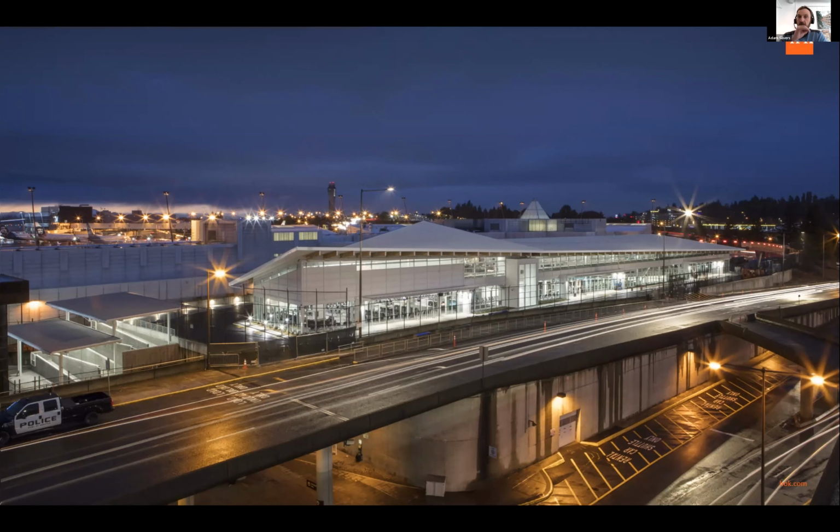This project was LEED version 4, the first one at SeaTac Airport, and the contract goal was LEED Silver. It was actually the first LEED airport terminal building in the US. The airport has district heating using steam, and that had to be used. Also, they have a master site plan that's a LEED rating system on its own. And so we had a lot of those credits fixed.